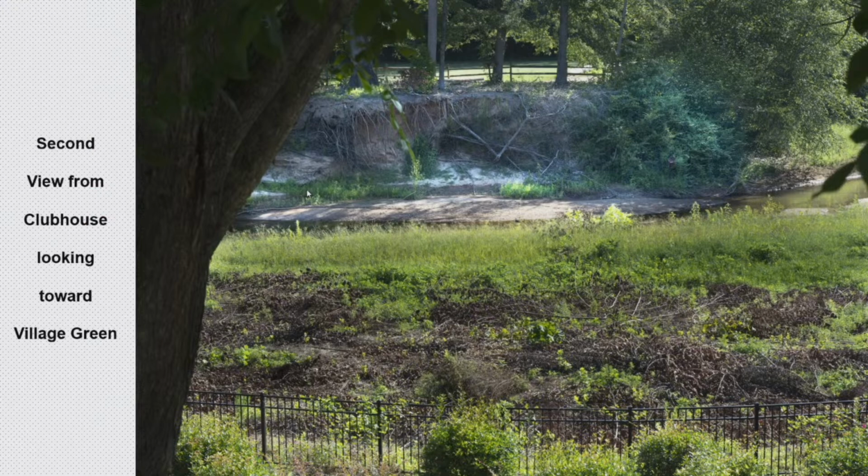Another shot of our river back behind the clubhouse. The plan is to move the river a little bit this way into this first part of this green area here, and put some what are called J-hooks in there so that we can minimize erosion with that. And then I think most, if not all of those trees will go, because we have to get 3-to-1 slopes and get plantings on them so they'll hold.